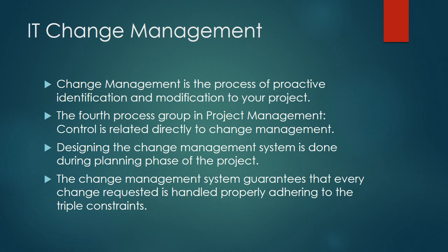Well, designing of such a system is done during the planning phase of the project. Identification of the authorized people who will form the approvers of the change controls, the documentation that is necessary, the tracking and the sign-offs, the change control form, the release note format. This is all planned and documented during the planning phase of the project.